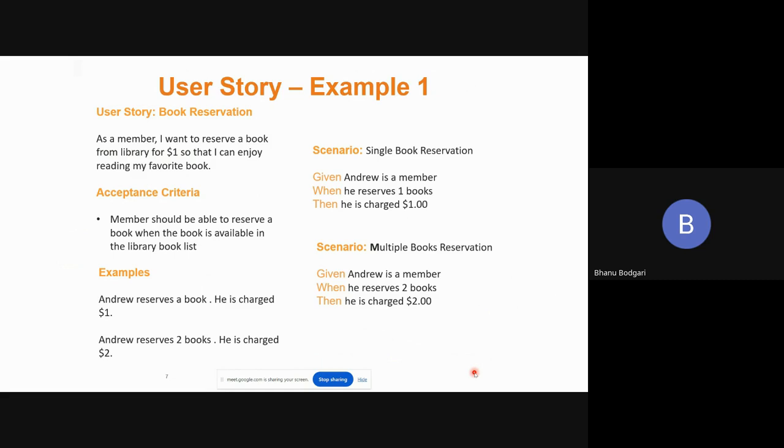Okay. So, to me, whenever we are discussing the first point where we discuss those user stories, way before, if you look at discovery, where we are trying to gather the requirements, that phase would not be a good place to get on with behavior driven development, because that is still too early. We are only looking at what we are going to develop, whether these are the requirements, whether these user stories or features are prioritized. So that is much earlier.